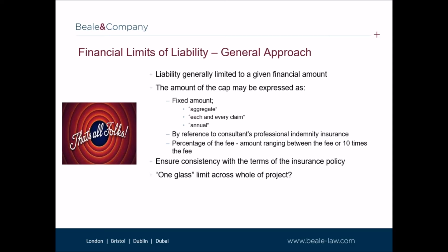The drafting is achieved by stating in the appointment that the consultant's liability for the whole commission is limited to a given amount and that the client indemnifies the consultant for losses over and above that amount. In addition, there's related drafting in the collateral warranties and the reliance letters acknowledging that there is one limit across the whole of the project, and also referring to the appointment.